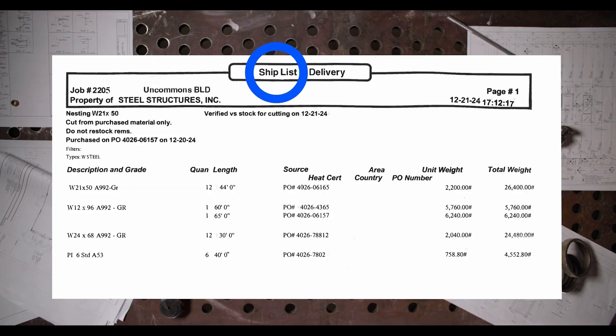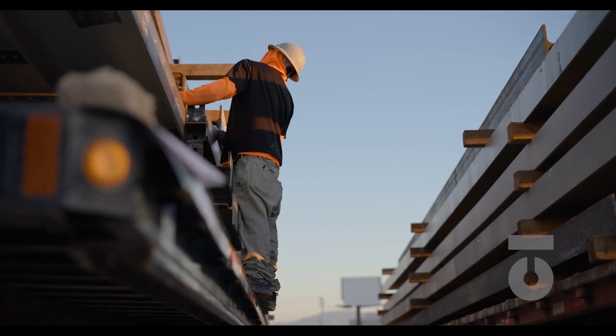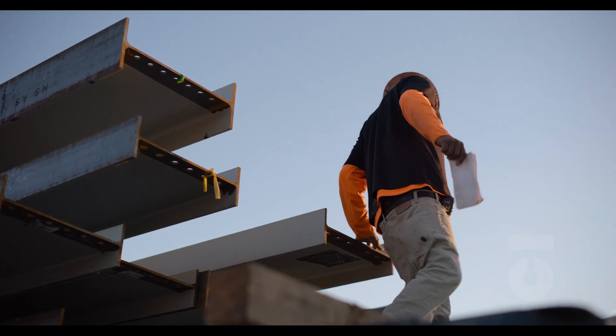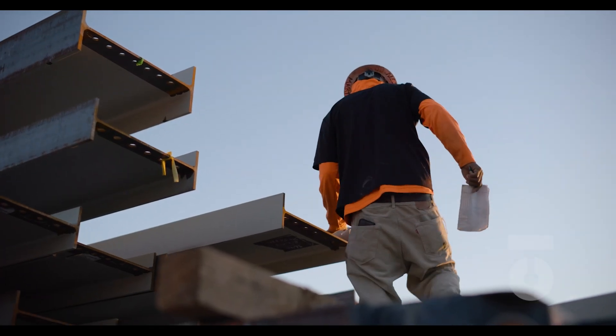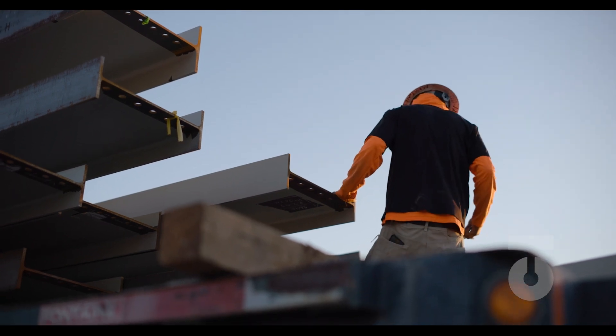If you recall from shipping in the fabrication process, steel that is last on the truck is the first off. On a job site where there is absolutely no space for staging steel — and we will be rigging, lifting, and installing straight from the truck — we need to be more organized than just saying 'I need these 29 assemblies for today.' What if they loaded the truck with five girder beams of the 29 assemblies to be installed for that day and we have no columns up?